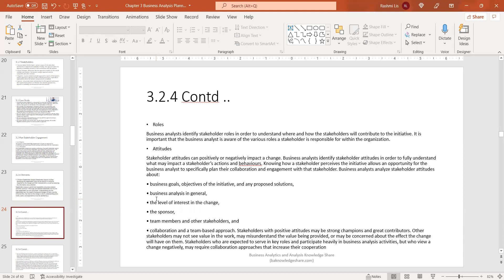Stakeholder attitudes can positively or negatively impact a change. Business analysts identify stakeholder attitudes to fully understand what may impact a stakeholder's actions and behaviors. Knowing how a stakeholder perceives the initiative allows the business analyst to specifically plan their collaboration and engagement. Analysts examine attitudes about business goals, business analysis in general, level of interest in the change, the sponsor, team members, other stakeholders, and collaboration approaches.